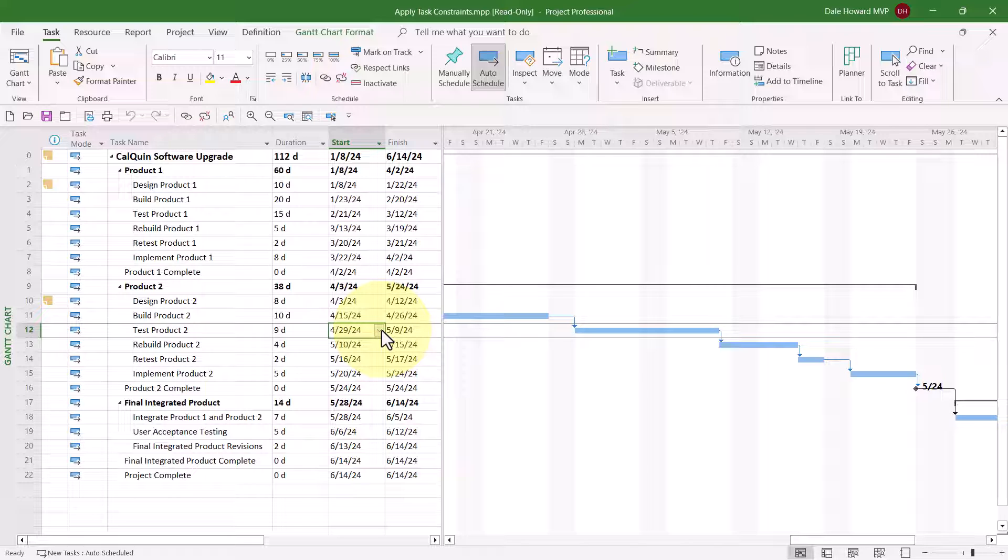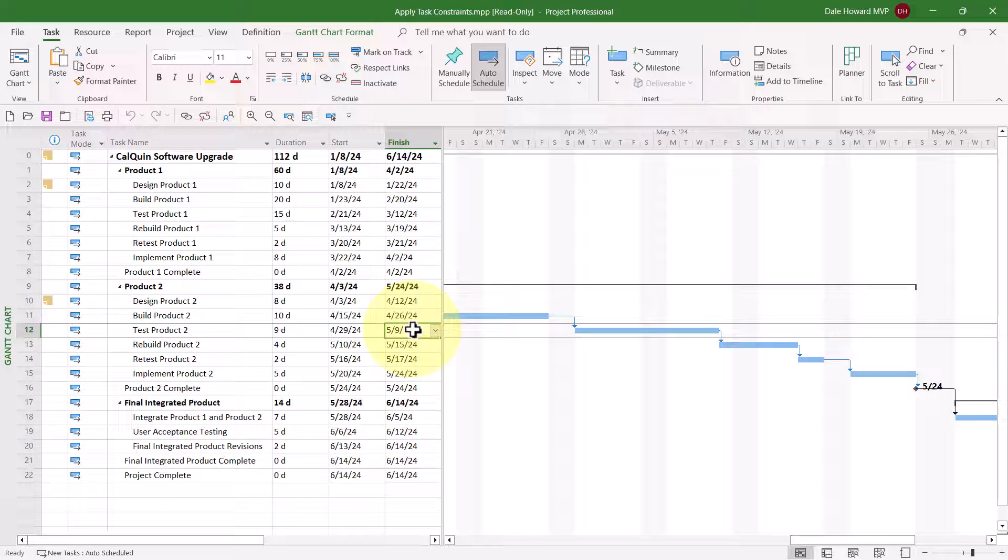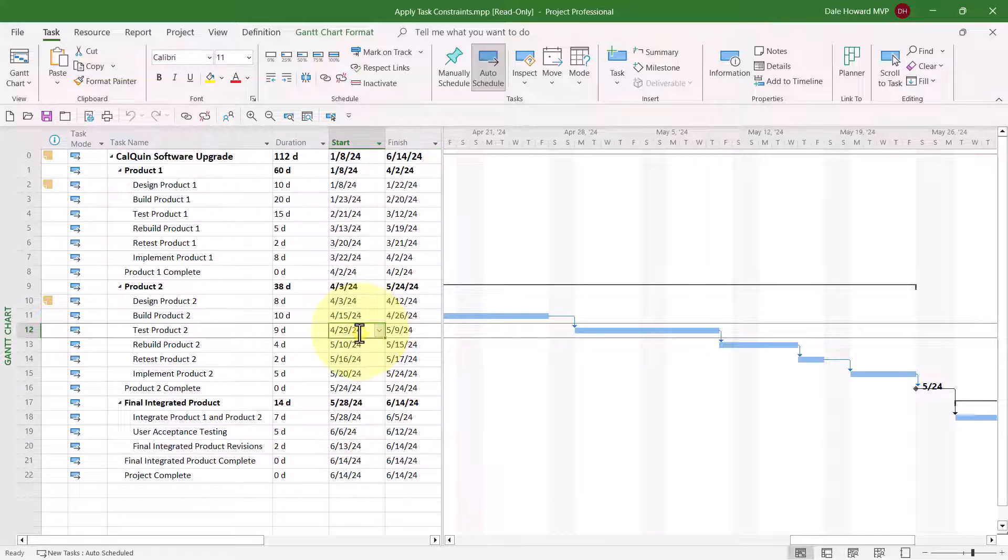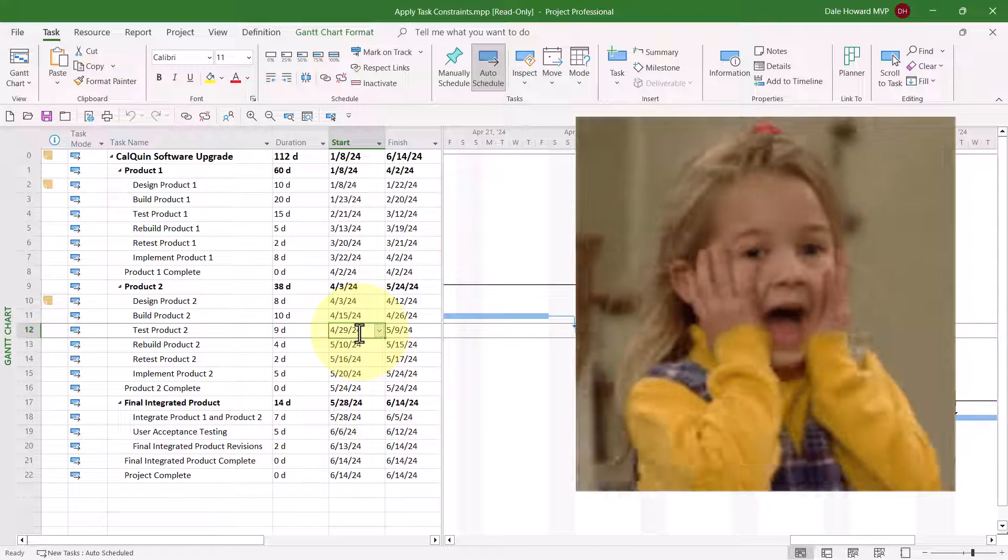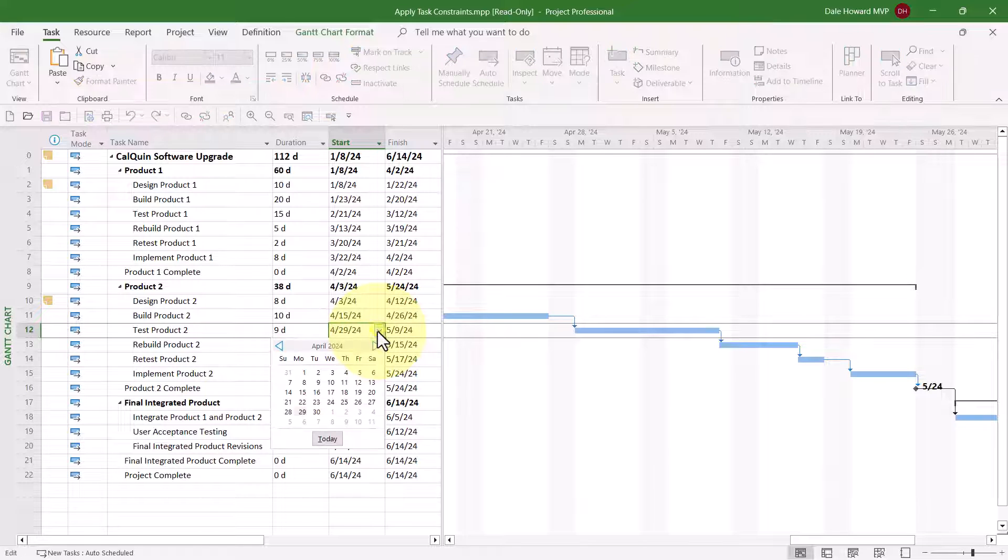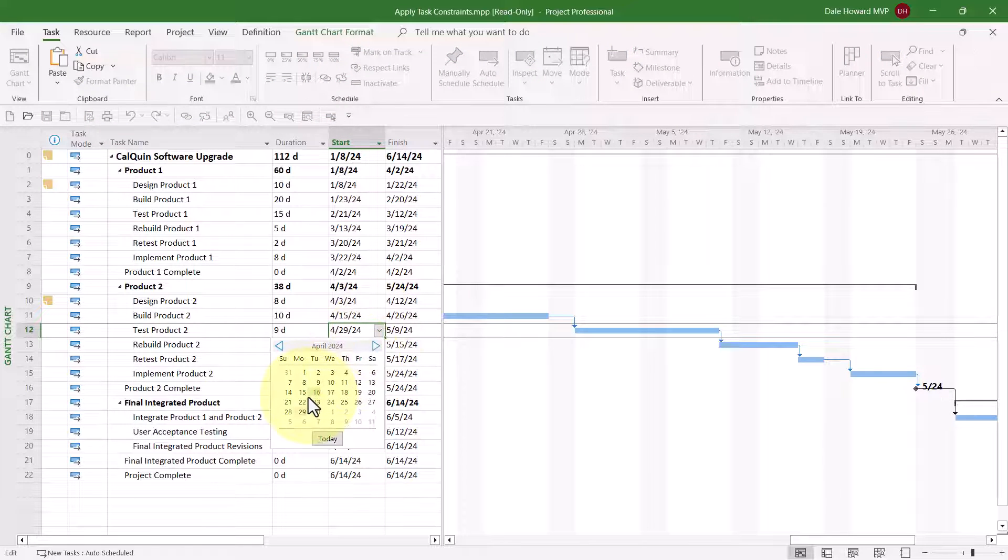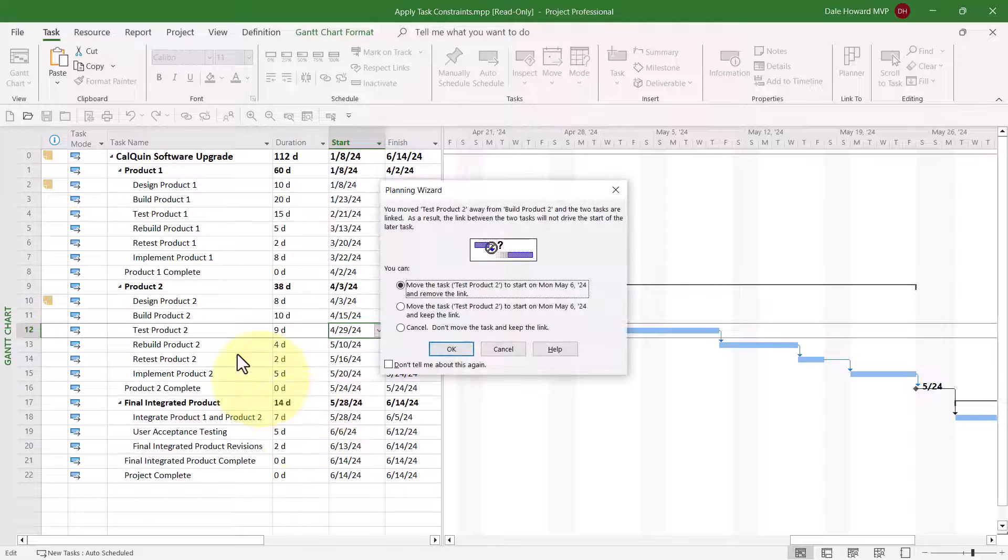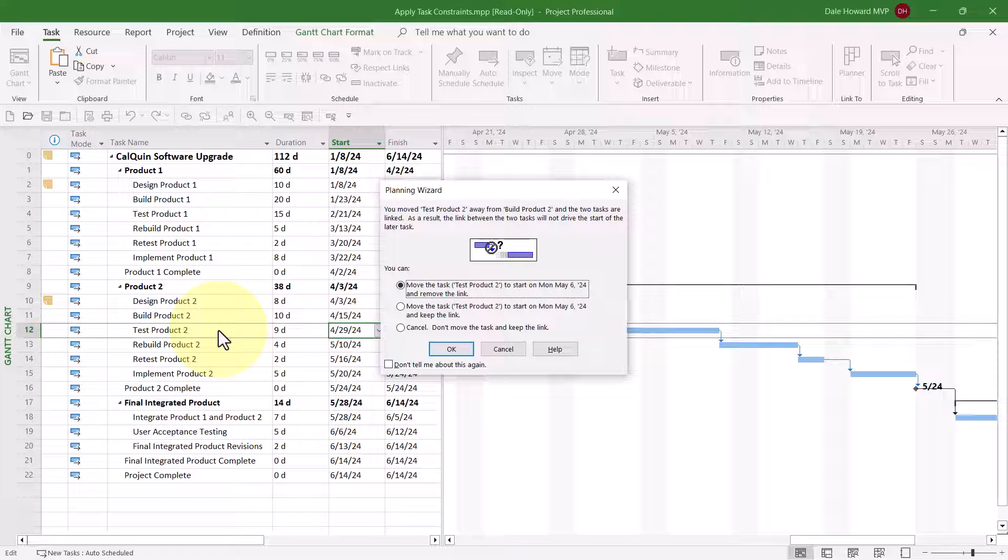The wrong way to set a constraint is to manually type or select a date in either the start or finish cell for a task. If you do that, Microsoft Project will automatically set a constraint, and worse yet, it doesn't ask your permission, and it chooses the constraint it wants, not necessarily the constraint you would want. Let me show you what happens if I try to do that. I'll go ahead and click in the start cell, and I'll choose May the 6th. Notice that Microsoft Project displays a planning wizard. This is Microsoft Project's way of telling us I'm going about this all wrong.